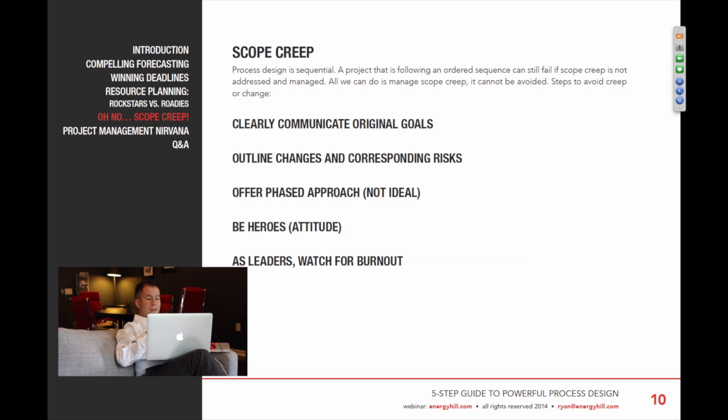Offer a phased approach. I don't really like this, but I have to put it in there because it's not ideal, but it can be done. What I mean by that is we break it up into phase 1, phase 2, phase 3. It's just one of those things that the project can then drag on for much longer, and more creep can occur because now we're in phases. It can be a rough approach to fixing creep or change.